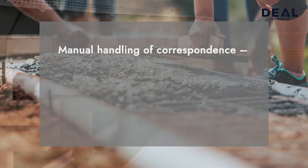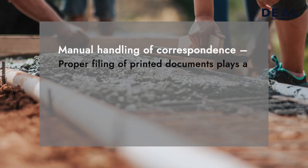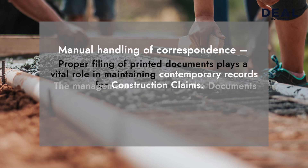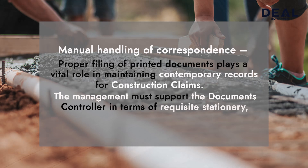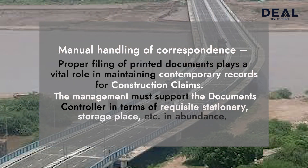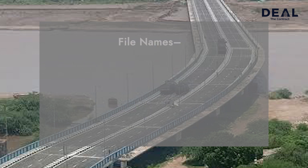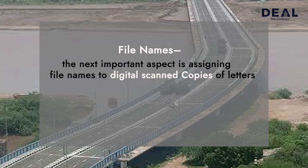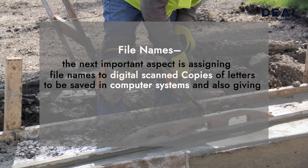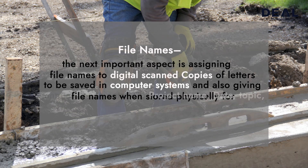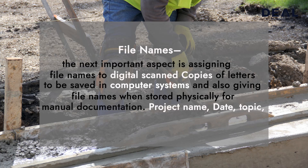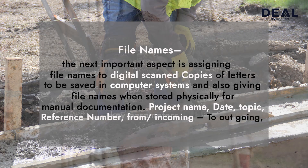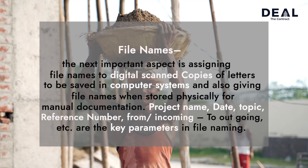Manual handling of correspondence: Proper filing of printed documents plays a vital role in maintaining contemporary records for construction claims. The management must support the document controller in terms of requisite stationery, storage place, etc. in abundance. File names: The next important aspect is assigning file names to digital scan copies of letters to be saved in the computer system and also giving file names when stored physically for manual documentation. Project name, date, topic, reference number, from or incoming, to or outgoing, etc. are the key parameters in file naming.